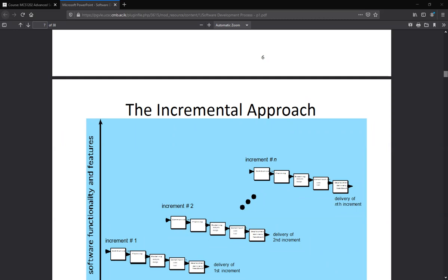But remember, it doesn't mean you don't need to do the lean requirement analysis; you should know the big picture. But then you work on one increment at a time. Sometimes you don't want to wait to start the next one. You can start in parallel, sometimes somewhere in the middle, and depending on resource availability, other things can start. This will gradually make a big piece of work, and if you have more resources, you can speed up the process.